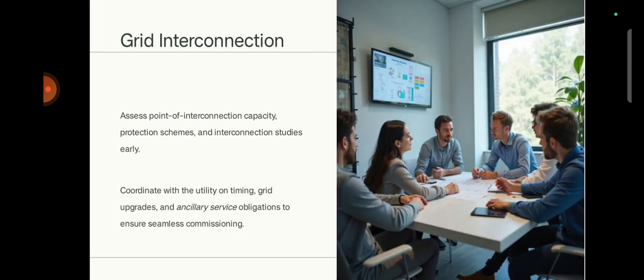Grid interconnection. Assess points of interconnection and capacity, protection schemes, and interconnection studies early. Coordinate with the utility on timing, grid upgrades, and ancillary services to ensure seamless commissioning.